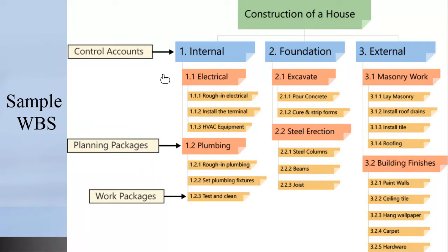So we share with them what we do, bearing in mind that certain companies may have a defined way that they do things. That's why it is important that you're in dialogue with all your major stakeholders, so that when you create your control accounts, they are in alignment with how your finance/accounting wants you to do it, or you can convince them to align with you. But there must be alignment so they can understand the numbers and you can understand the numbers.